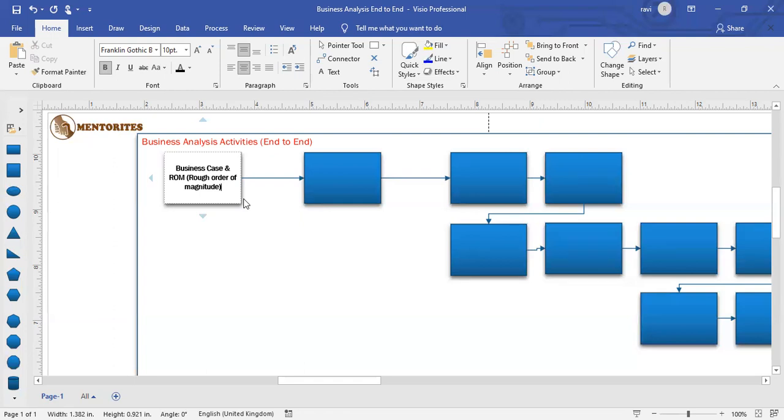Then you engage with your infrastructure team and take the server related requirements from them. Then you engage with your security team and take the requirements on network related requests. Then you engage with your platform ops teams and take requests on the operating system that needs to be used. And then you engage with your database team on what the database version is that is compatible with this. So it involves a lot of stakeholder engagement, right? That's why this often comes to a BA.